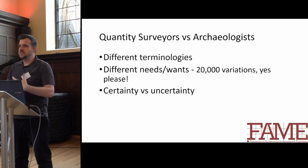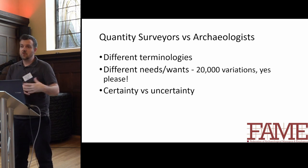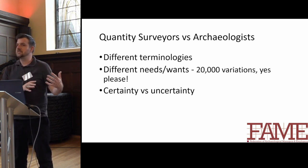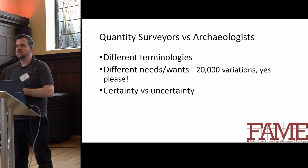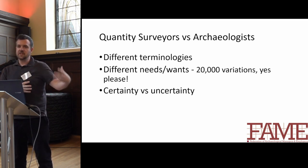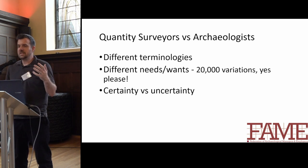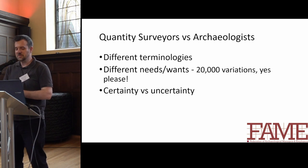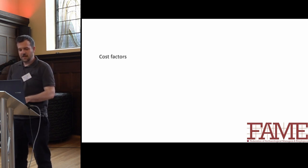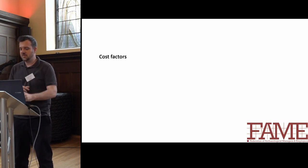Another issue is that archaeology, especially excavation, deals with a lot of uncertainty. Whereas normally a QS deals with a lot of certainty — except for excavations, almost the entire project has already been itemized well before a shovel goes into the ground, so they're quite set on prices. Whereas in archaeology, we can come back and say, oh, we found a bunch of things we didn't know was going to be there. And archaeology also has a slightly different problem from a lot of other professions.